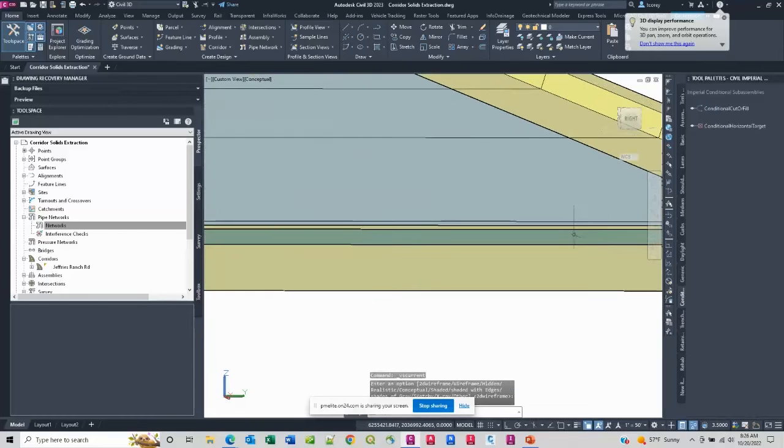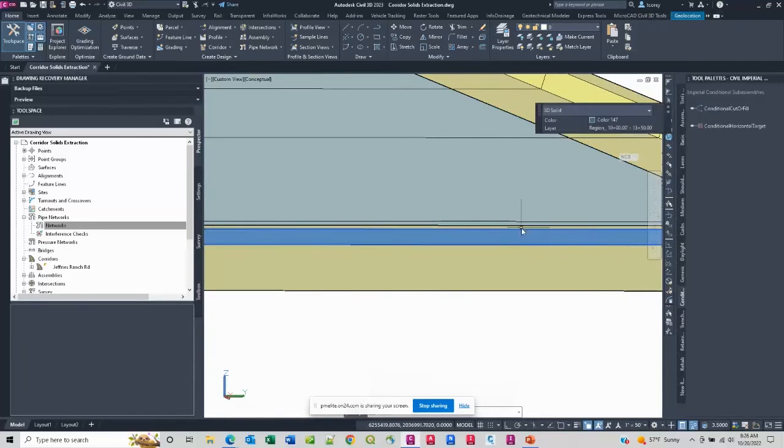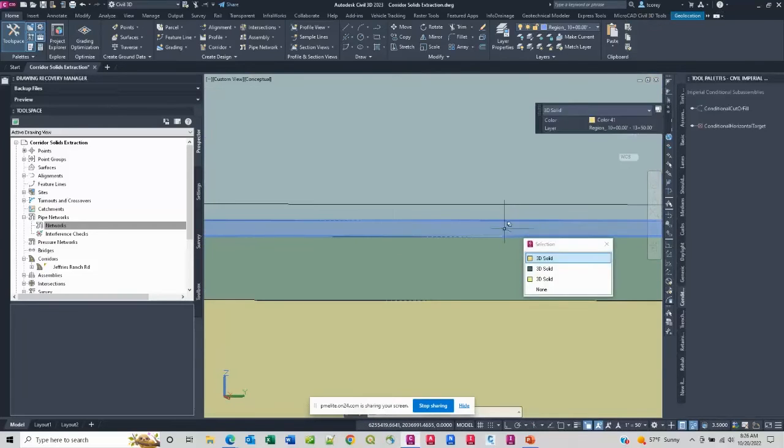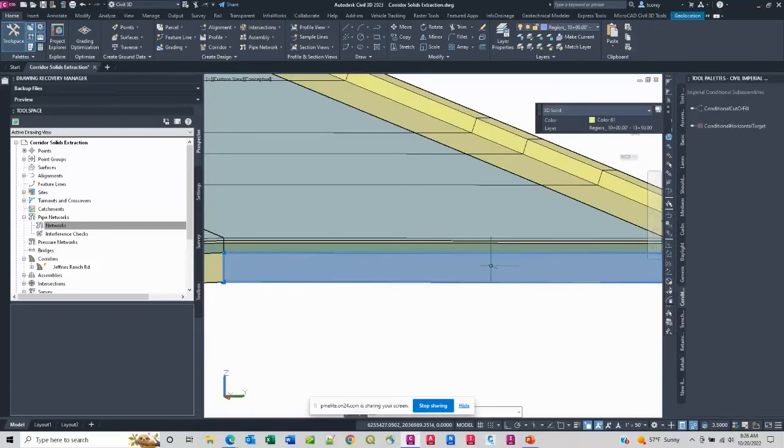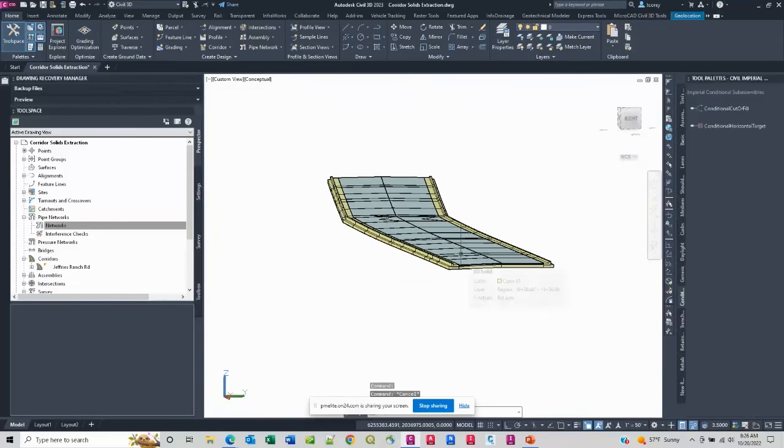Okay, do you see that's my pave 1? There's pave, that's first aggregate or first base. There's pave 2. This is the sub base. And then I've got curb over here, etc. So all of those codes basically are import materials being separated like that. That's what allows us to assign those to tasks within our timeliner and do that animation.